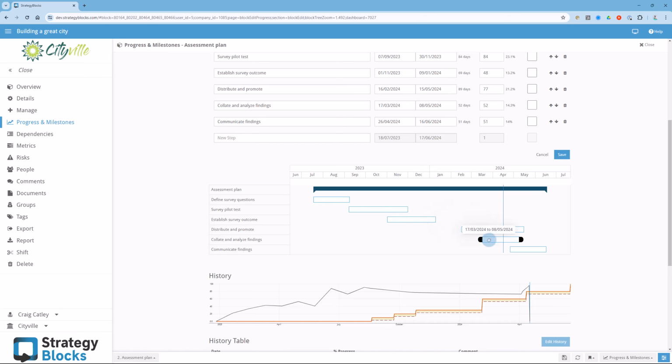You can also use the Gantt chart itself to drag the milestone steps in the timeline or alter their duration when using date-based calculations. Notice how steps can have planned gaps between them or overlap. Now, as time progresses, block progress will retain its status until the completion of the next step.